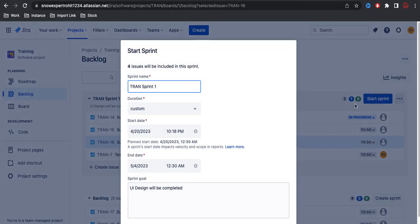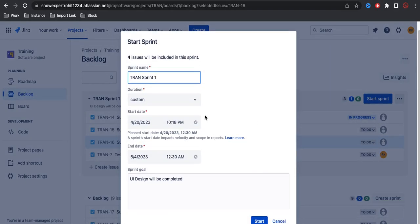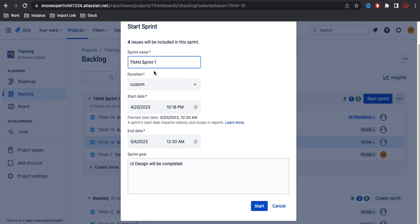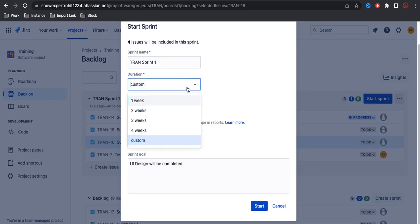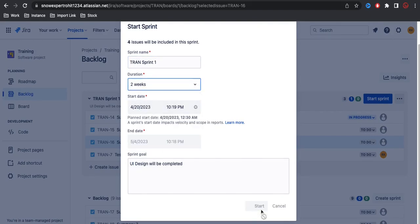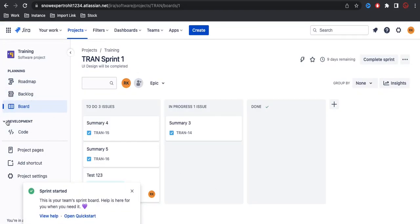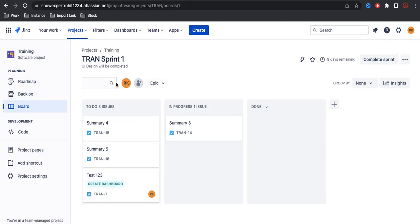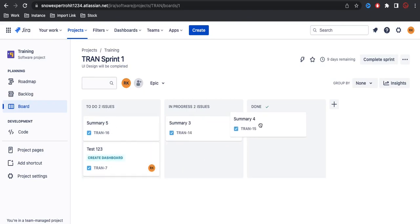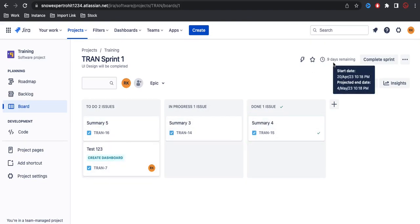Once we click 'Start Sprint', the sprint will be started. I have four issues in the sprint and this is the sprint goal. I'll click 'Start Sprint' - this shows the sprint name and all the details including the start and end date. You select two weeks and then click start. The sprint is now started and under the board it is showing the current sprint. Developers will start working on the current sprint and move tasks as they complete them. The sprint shows it will end in nine days.